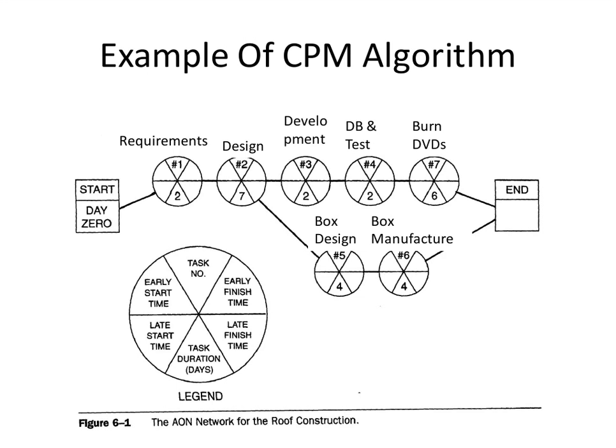Going back the other way, the reverse way, we're actually taking what? What were we taking here for this late finish time of node 2? We were taking the minimum of the late start times of the 2 nodes that depend on that, to wit, task 3 and task 5. We are looking at the minimum of those times, and we took the minimum, therefore, of 9 and 11 here, and we got 9.